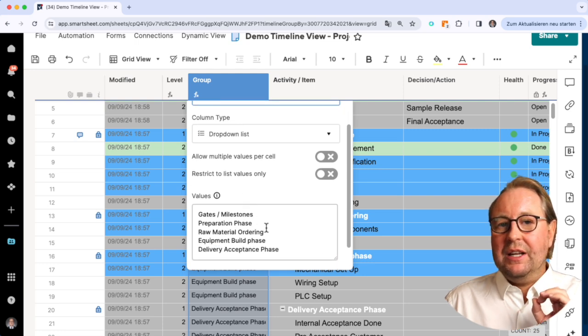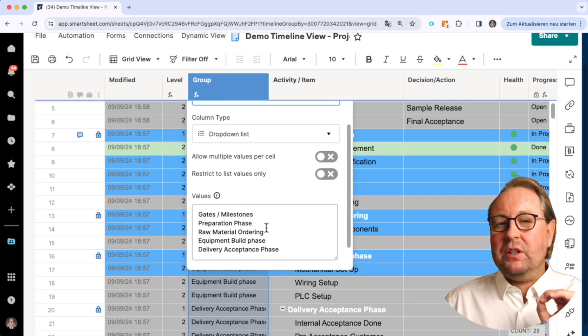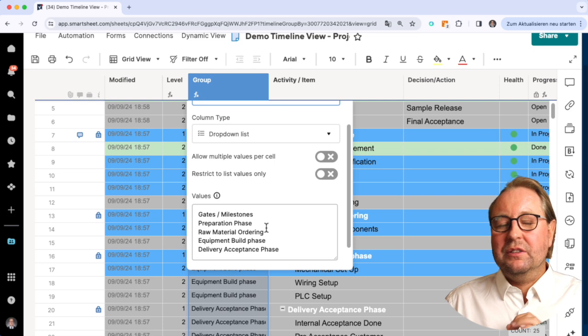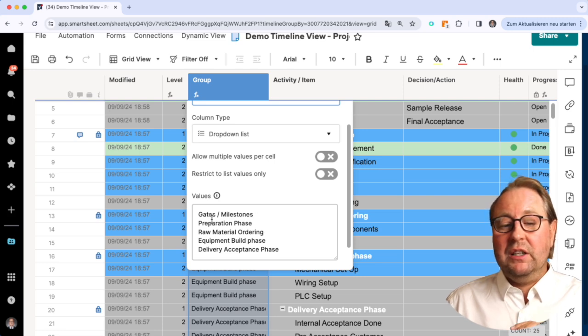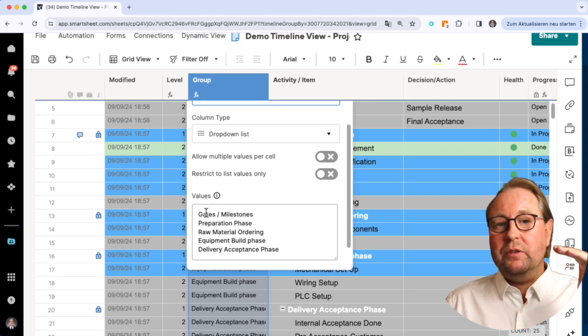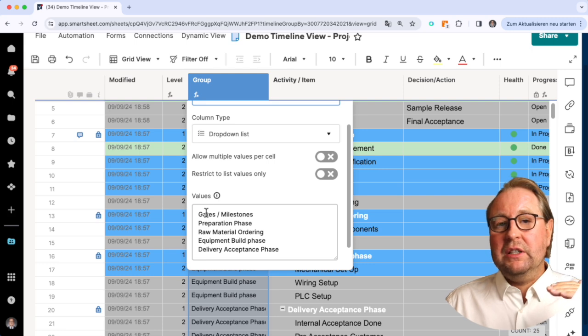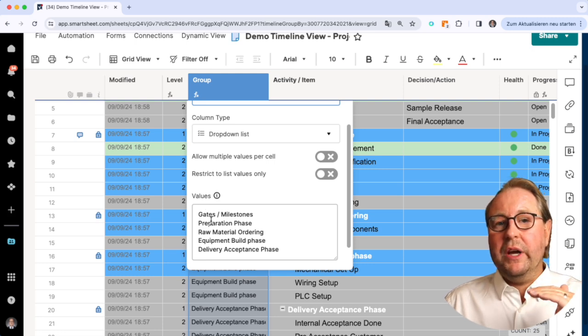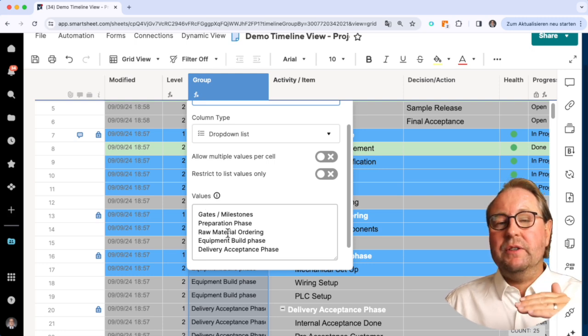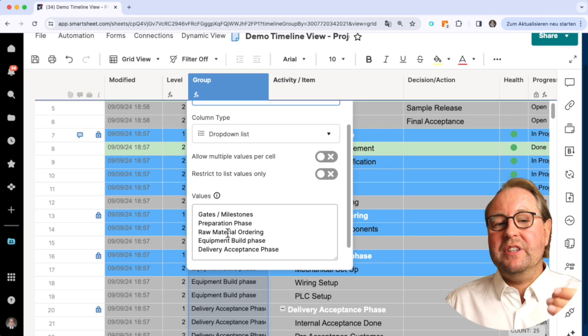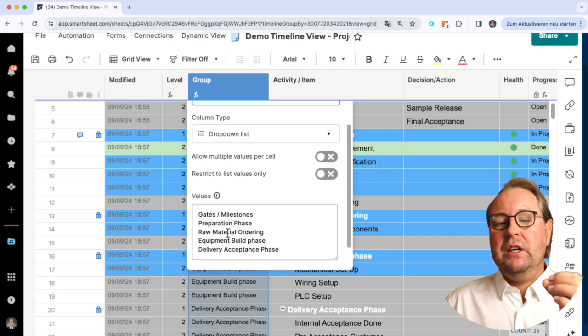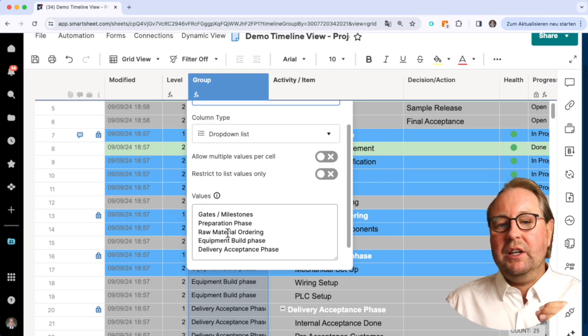Last but not least, the important topic is that the values of the dropdown list need to be sorted in the way as we want to have it presented in the timeline view.